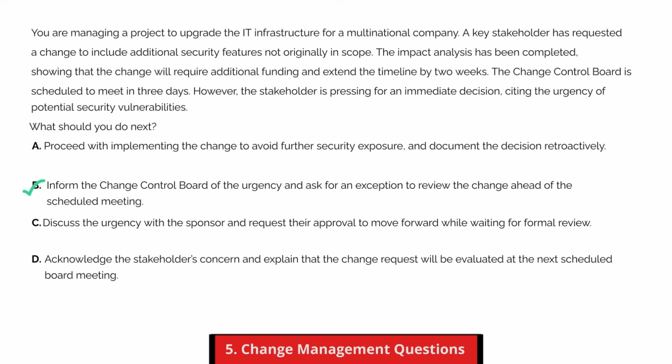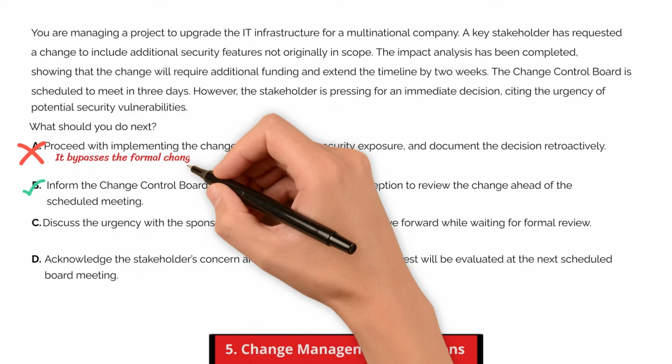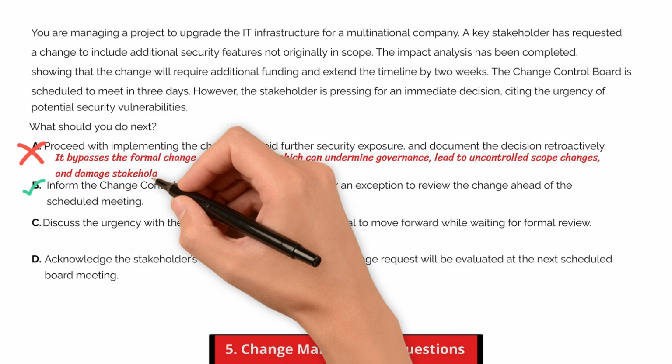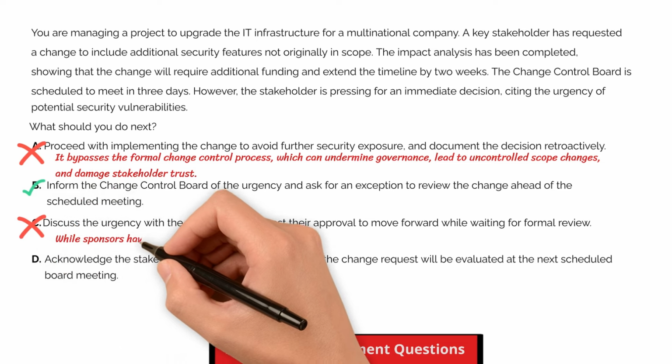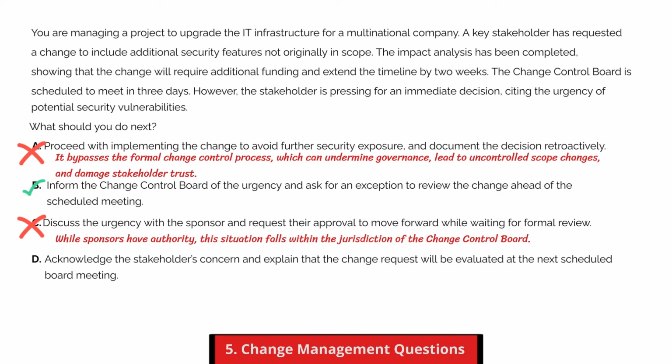Let's look at why the other choices are wrong. Choice A is incorrect. It bypasses the formal change control process, which can undermine governance, lead to uncontrolled scope changes, and damage stakeholder trust. PMI stresses disciplined change approval, especially when funding and schedule are impacted. Choice C is incorrect. While sponsors have authority, this situation falls within the jurisdiction of the Change Control Board. PMI expects project managers to honor change governance processes rather than reroute approval informally.